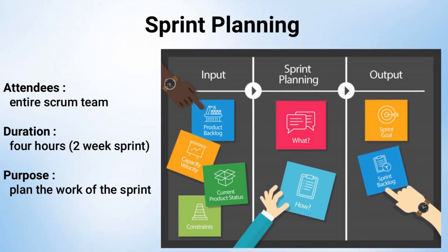Before the meeting, the product owner usually has a proposed sprint goal and a minimum set of issues that accomplish the goal. During the meeting, the team usually discusses the sprint goal, modifies the sprint backlog, places story point estimates on issues, and adds details to the issues to better describe the specific work to be done. The development team is responsible for estimating the story points for the work and deciding on how much work can be done during the sprint. This is an example of an empowered team rather than a command and control based team.